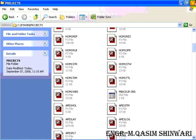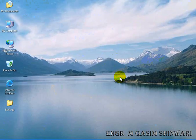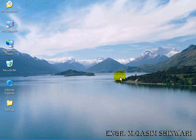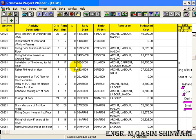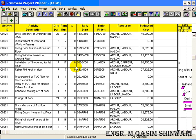The second method which I would like to tell you, but I should say the second precaution about which I should tell you, is that there is no Undo command in Primavera Project Planner. If you have done a mistake you have simply to redo manually. There is no Control Z combination, there is no Redo. So be careful while changing or modifying the existing data or creating the new data.